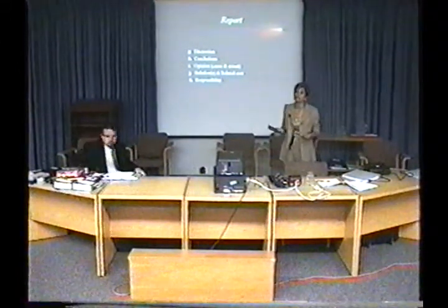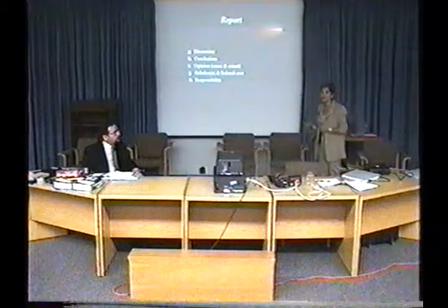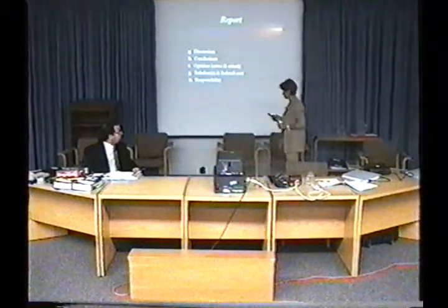So what we did is, again, made a simple model of the first one versus a simple model of the second one. And we just chose a couple of bays of the structure because it was a huge one, and obviously a large amount of money was involved in the case. By looking at the two simple models, you could establish, yes, this is much more complex than that. Something that we couldn't establish by words or by explaining. The more you try to explain it, the more complex it becomes. So using models or similar simulation of the events becomes very important in establishing a case.